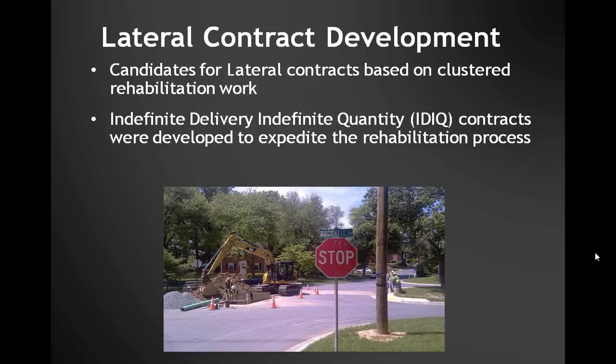We try to assemble candidates for lateral contracts based on clustered rehab work, taking action where rehab efforts were already underway. The ultimate goal is to rehabilitate one area at a time to limit construction disturbance. We've seen instances where a single house connection was excavated and not completed until the rehab contract came through the following year, leaving residents dealing with work on their street for over a year. We developed indefinite delivery, indefinite quantity contracts to keep work flowing — essentially a master contract with task orders generated within.